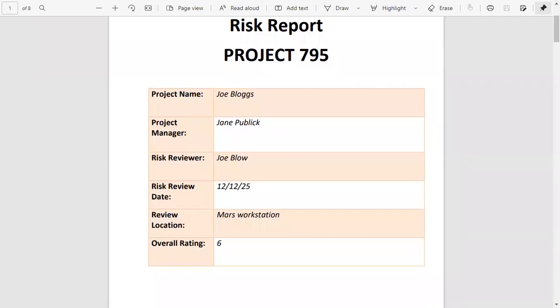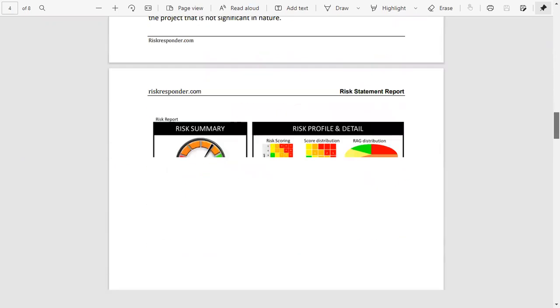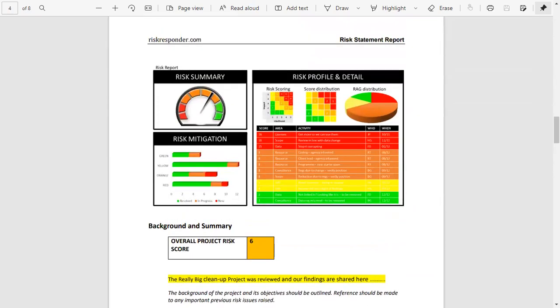All right, so does your risk report tell management about risk exposure, however they understand it? Does it go into enough detail while still remaining high level for them to not get lost in the weeds? When you're aggregating the effect of the individual project risk, it's okay to use EMV. If you're using a Monte Carlo, information like that could be summarized. And in the PMBOK guide, there's a very good high-level example of what you could get from a Monte Carlo, what your simulation could look like.